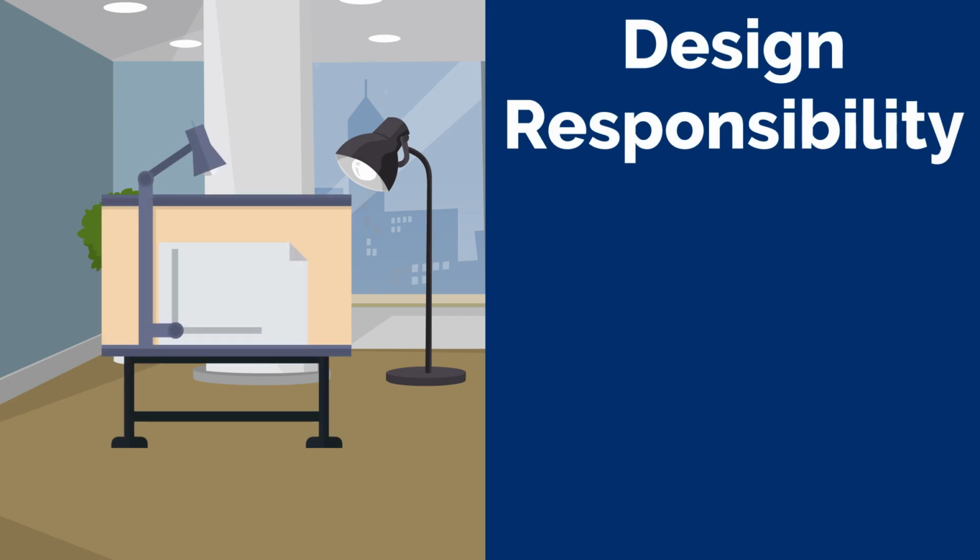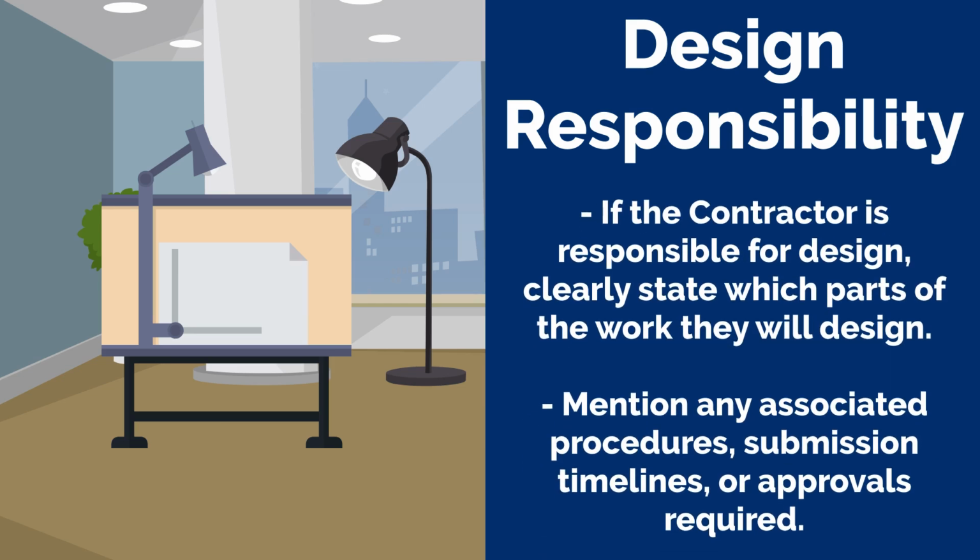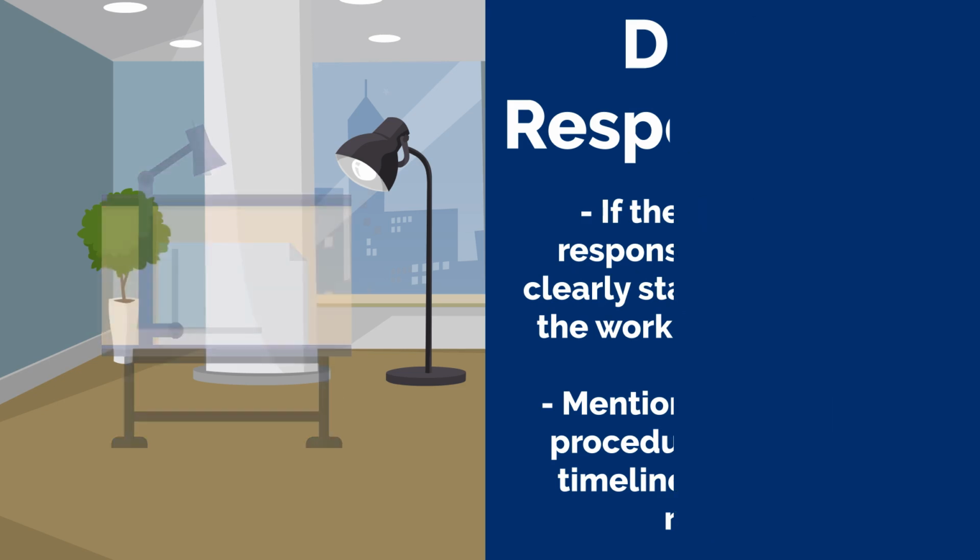Design responsibility. If the contractor is responsible for design, clearly state which parts of the work they will design. Mention any associated procedures, submission timelines, or approvals required.